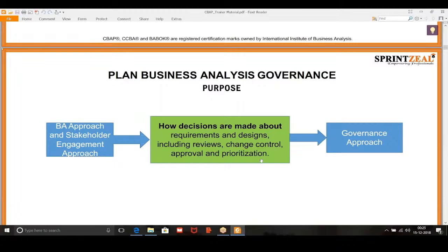These are some examples. Of course, you can be creative about it. You can put more details. You can also use existing documents around change control. So again, you can review the existing documents that are a part of your organization. They are called organizational process assets also, OPAs. You can pull them out and see how the change control process works. You can borrow some content from there and put it here, and then you can highlight how the approval